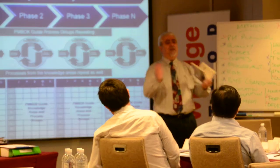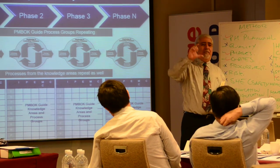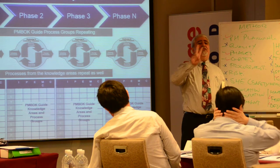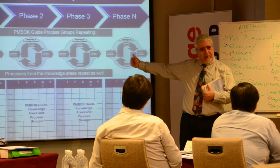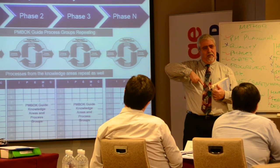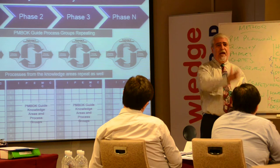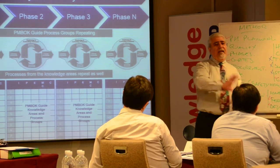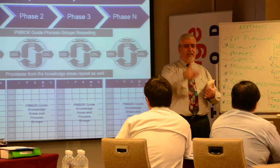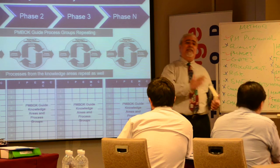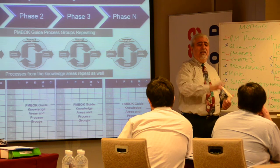When I look at the PMBOK, I divide the planning processes into two parts: management processes — what PMI calls the project management plan — and technical/detailed processes. I think in the 2000 edition there used to be two plans, and then they merged them. In my book, my project management plan is not the same as PMI's. There are management processes like how to manage scope, cost, time, and risk. And then there are technical processes, like developing the schedule, sequencing, activities list, and critical task analysis — this is detailed scheduling, not management. In the cost area, managing cost and contingency is different from estimating.